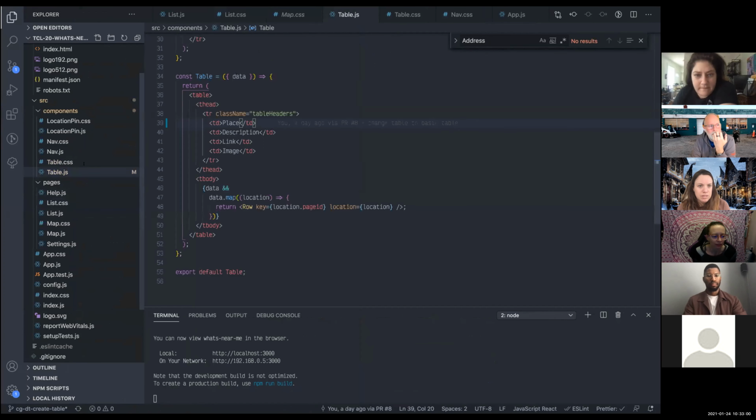If your story was big and included 3 different features, there'd be an expectation that you could get all 3 of those features done before you ship the thing. But maybe you really only need one of them. Maybe one of them is the really high value thing and the other 2 are nice to haves. So small stories give the business more flexibility in deciding when it is done.